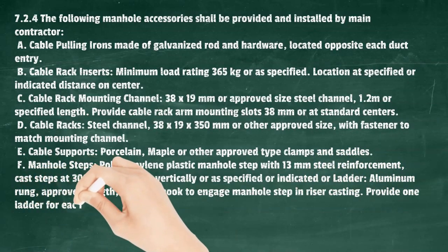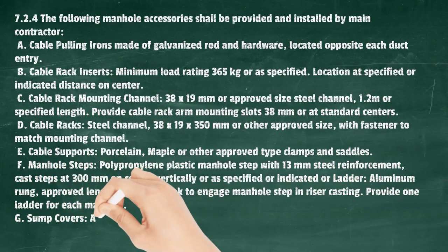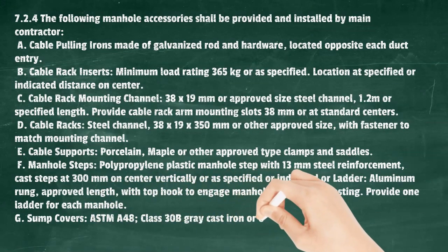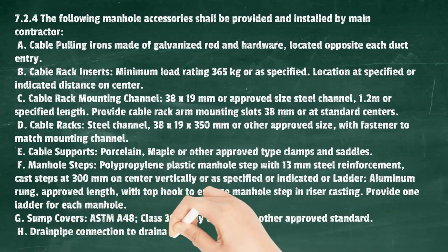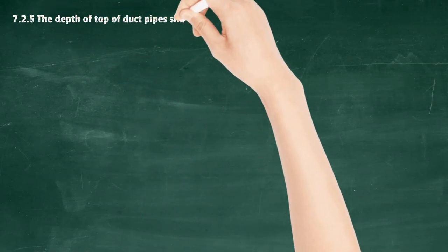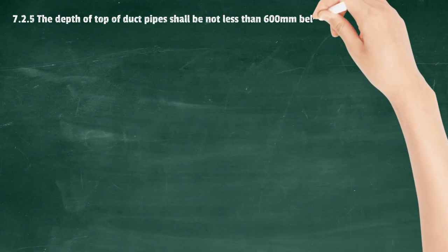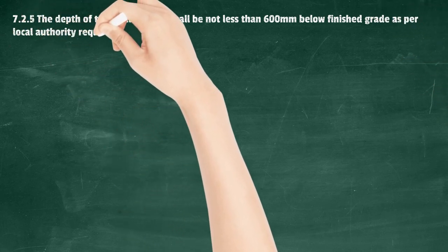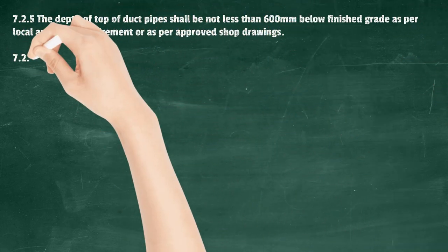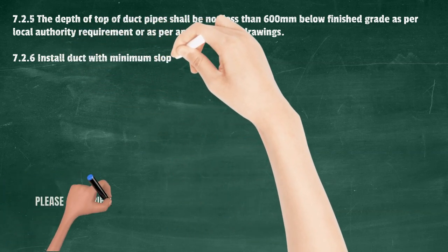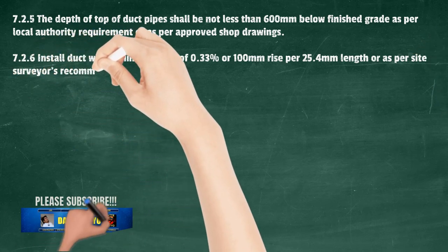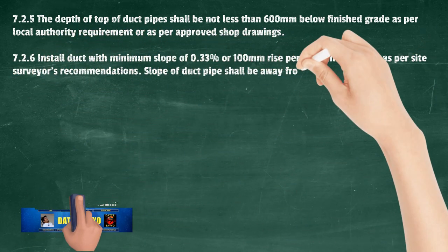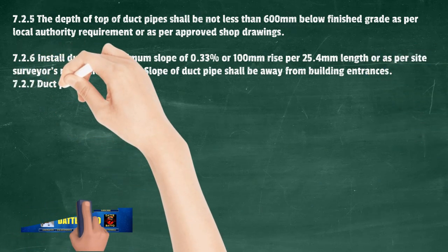Provide one ladder for each manhole. G) Sump covers: ASTM A48, class 30B gray cast iron or other approved standard. H) Drain pipe connection to drainage line. The depth of top of duct pipes shall be not less than 600 mm below finished grade as per local authority requirement or as per approved shop drawings. Install duct with minimum slope of 0.33% or 100 mm rise per 25.4 m length or as per site surveyor's recommendations. Slope of duct pipe shall be away from building entrances.